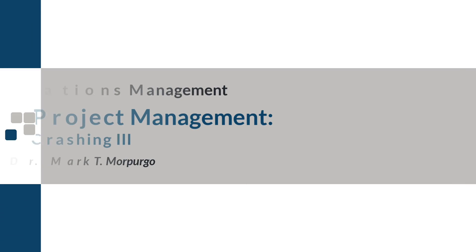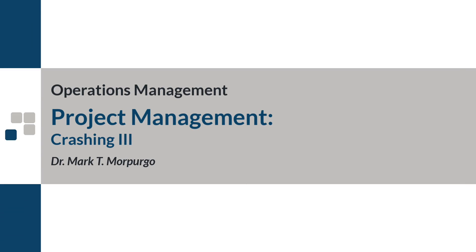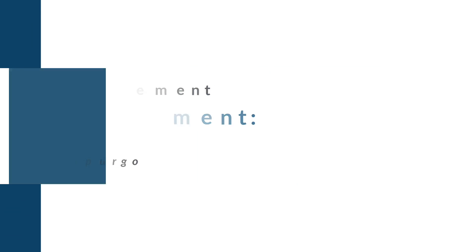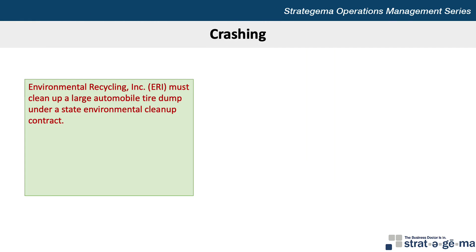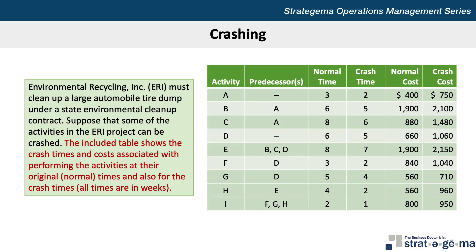This problem walkthrough video will demonstrate how to crash a project after drawing the network diagram and determining the critical path. Here's the data for our problem. Environmental Recycling Inc must clean up a large automobile tire dump under a state environmental cleanup contract. Some of the activities in the ERI project can be crashed. The included table shows the crash times and costs associated with performing the activities at their original normal times and also for the crash times. All times are in weeks.